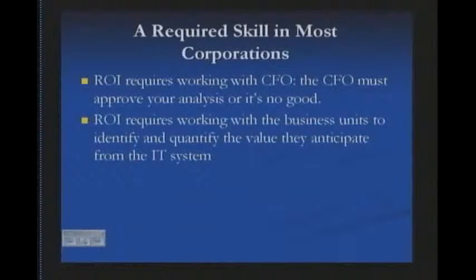ROI requires working with the business units to identify and quantify the value they anticipate from the IT system. So it's not exclusively going to be done by the IT department in an IT department vacuum. In order for an ROI analysis to be done properly, for at least large systems, you've got to involve the end users or their senior management, as well as the CFO, and oftentimes other key players in the company in developing that ROI analysis.